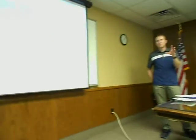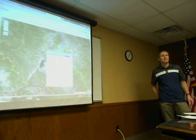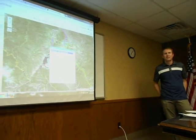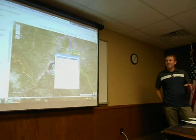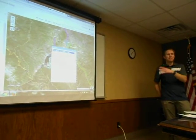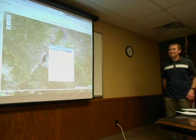So that should be starting by the end of the month approximately, give or take. It depends on how long it takes them, maybe a little later when they find gravel. Well, they could. A lot of these are tied to when they actually get the notice to proceed and they get all their documents in and back and forth and all signed. So don't hold me to the exact date on when that happens.